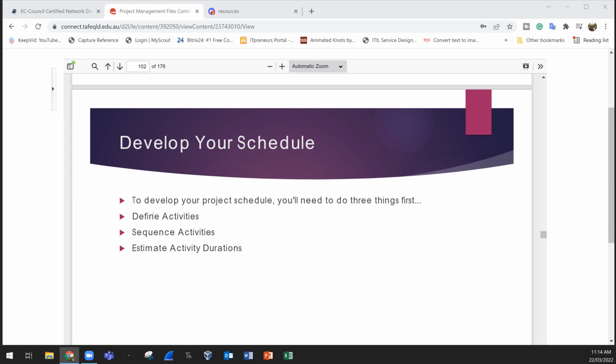So defining activities. If you have experience, fine. So you know the activities, then you can define the activities, then sequence the activities, which one will happen first, and the relationships between activities. Then in this way, we can estimate activity duration. If we estimate the activity duration, we can know the total duration of the project. And we can start calculating the cost.